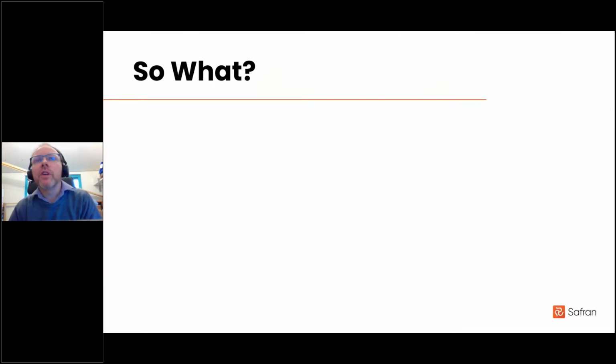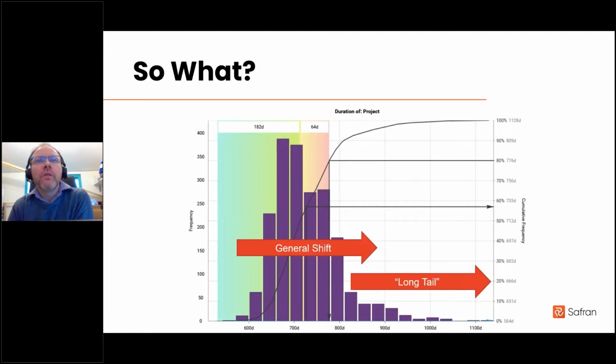Now, if you're not yet a seasoned analyst and you're thinking, I understand the principle, but is it really that big of a deal? Then let me give you two quick examples of why these modeling principles can really matter. So first, if all your risks were set to impact in series, then this clearly over-exaggerates the effect that foreseeable risk may be having on your risk-adjusted project forecast. Now, hopefully that was already clear and that this is a bias that's worth filtering out so you don't provide misleading outputs. But the second example is more subtle, but it's just as bad.